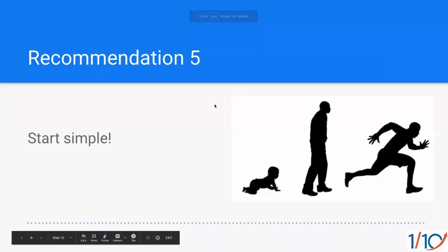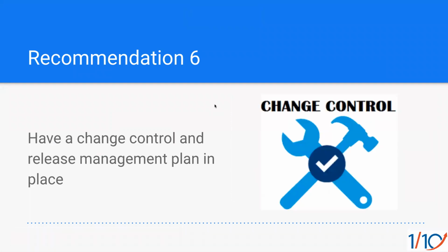All right, so our 6th recommendation here is to have a change control process in place. And I'd say 9 out of 10 organizations I work with really have not thought through this. So you invest all this time and effort in rolling out this system, and then we're all celebrating, we're all eating cake, we're all happy, the old system is gone, the data's been moved over, we've trained everybody, and then here comes the onslaught of enhancement requests, questions, data problems, bugs, you name it, and there is no process in place to address it. And people start getting frustrated. Oh, I wish we had the old system back, or I'm just gonna use my side spreadsheet until you all have this sorted out. So having a clear change control process in place is ideal.